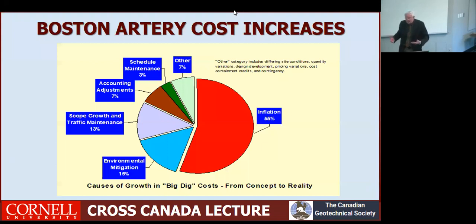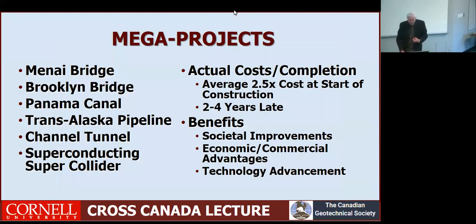When they built the channel tunnel, they changed the whole safety configuration of the trains in the middle of building the channel tunnel. That had enormous impact on cost on that project too. And then by delaying things, you just compound that increase in cost by virtue of the cost of borrowing money that moves you down the lane.